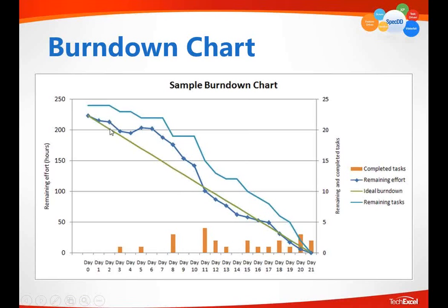Since the time remaining is estimated by each team member, regardless of skill level, a newly joined team member may estimate a task requires 5 days, when actually it's going to take a skilled programmer only 1 day. But nevertheless, this 5-day remaining is more accurate because that is the reality of a newly joined programmer, of how much time it's going to take for her or for him to finish.